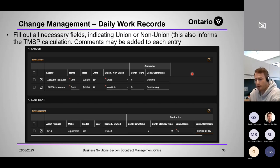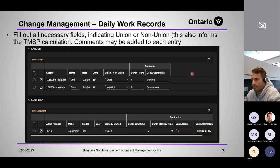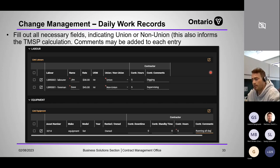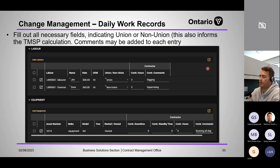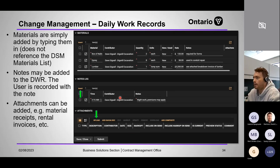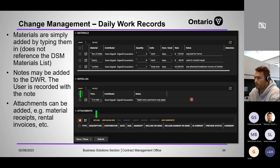The inspector would turn around and give it to their CA, who would use those DWRs to review hours in the TMSP. After the inspector inputs their comments and hours and submits, it goes to the CA, who gets their own column showing their hours and comments. Whatever the CA's hours are, those will be pulled into the TMSP. Every DWR will have a transparent record of contractor hours, inspector hours, and CA hours; the TMSP will show what was actually paid. Same for equipment.